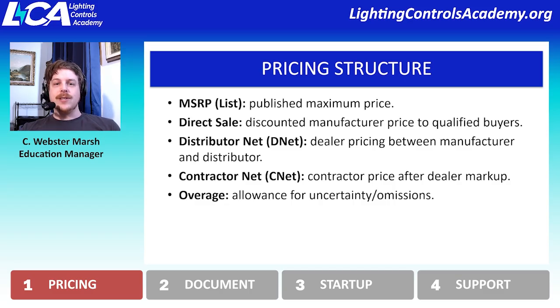And so they'll add in overage. They might not show it as a separate line item in their quote. They might just have a big lump sum number at the end of the day showing, okay, this is what my quote for the system is going to be. But within that, in their own books, they'll probably mark out additional overage just to cover unexpecteds.